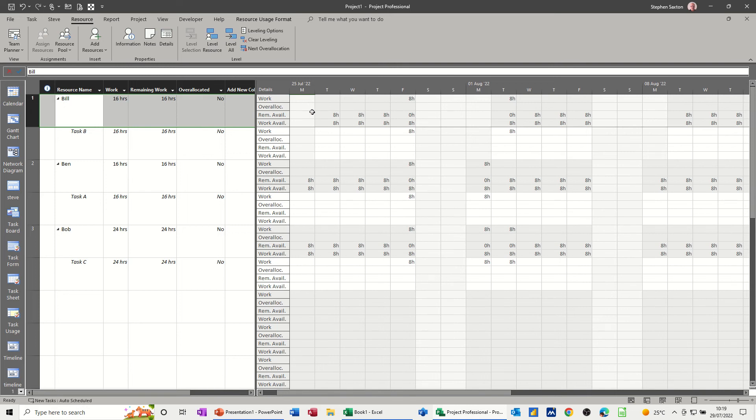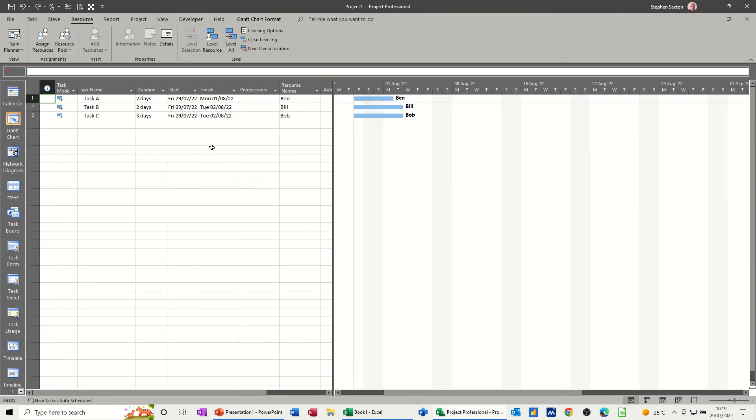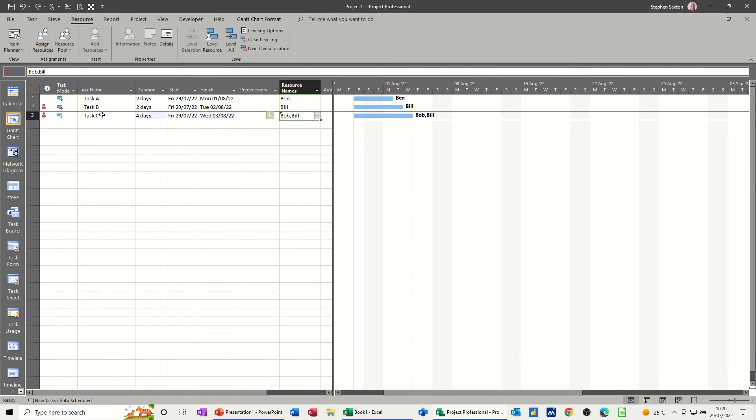Now let's go and put a spanner in the works, and do some over-allocations, or mess this up a little bit. So if I go back to the Gantt chart, and put Bill on this second task, third task, so he's now over-allocated on these two tasks.